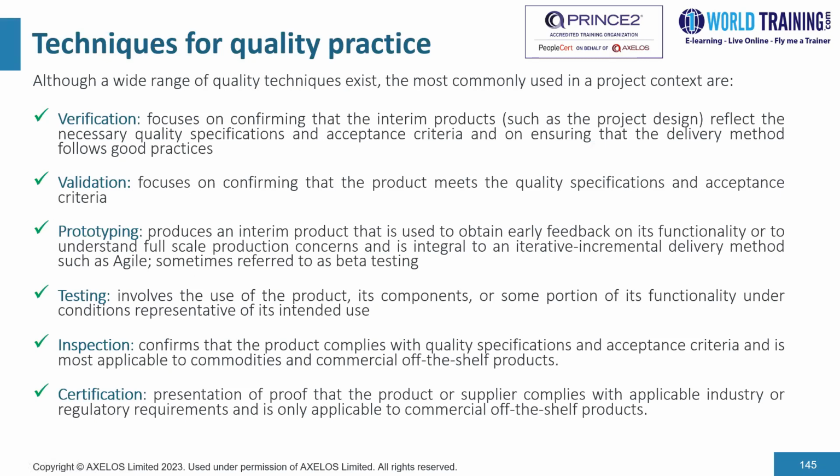Although a wide range of quality techniques exist, the most commonly used in a project context are verification, which primarily focuses on confirming that the interim products, such as the design of the project, reflect the necessary quality specifications and acceptance criteria, and on ensuring that the delivery method follows good practice. So that's one of the techniques. Another technique is validation, which focuses on confirming that the product meets the quality specifications and acceptance criteria.